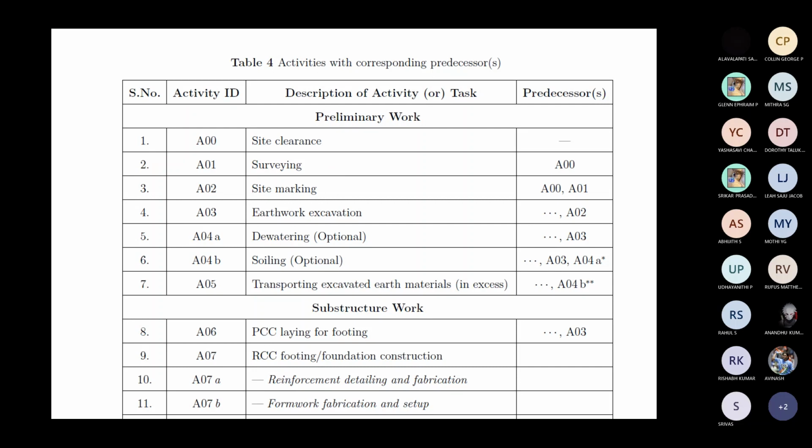You cannot haphazardly map the elements in the ground. You should have a scientific principle and scientific document to measure, not only to measure but also to provide good measures to construct, or even to excavate, right? Then it is site marking. So you can see site marking depends on surveying. After surveying, it gets site marked, but surveying itself is after site clearance.